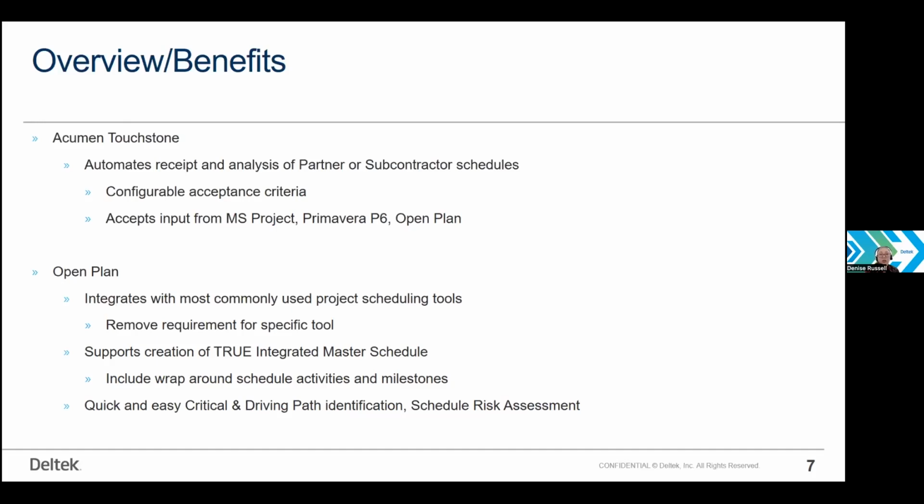At a functional schedule management level, OpenPlan provides the ability to plan and manage any size project schedule. It is built to be intuitive so that you can quickly take the actions that you need to take, do the analysis that you want to do. It does have some unique features, including being able to define user validations. So you can establish rules to help train folks in proper ways to do scheduling. You can have multi-level resource management, so not just looking at the resources at a project level or a component level, but looking at the resources over an entire portfolio of projects if you would like. And you can have multiple people working in the file at the same time, which can come in handy when you have really large programs where you might have half a dozen schedulers working on the same project.